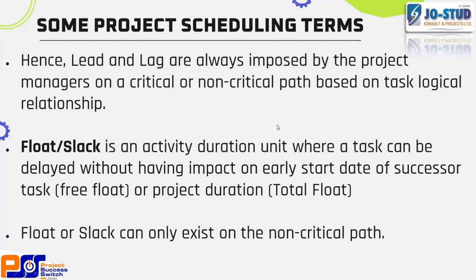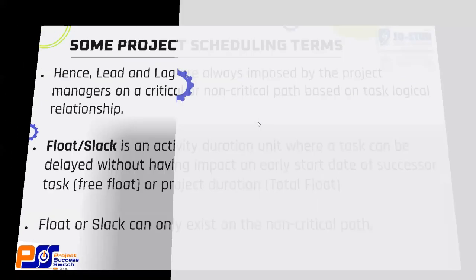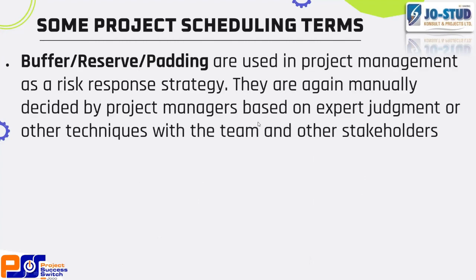Now, when you are using MS Project, there's what we call buffers. Sometimes I create buffers, reserves. There's what sometimes we call it padding. Padding is not the professional word. It's better you use the word reserve or buffer zones. That means you can add maybe 1 or few hours to your duration. Maybe you ask your mason, how long will you do this? You ask 3 masons. You can decide to just add 1 in case somebody takes ill.